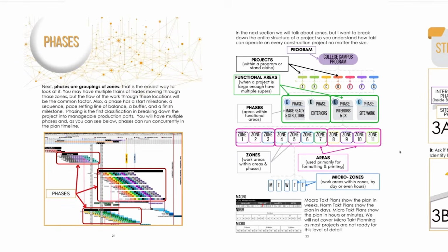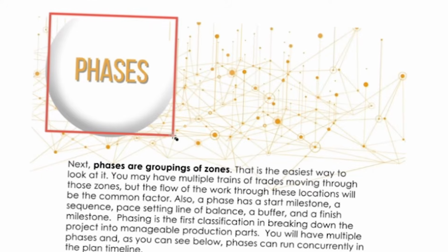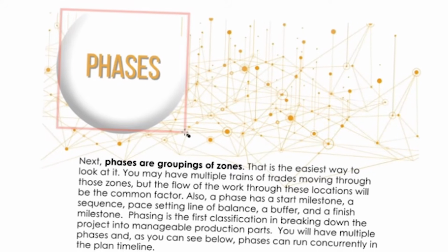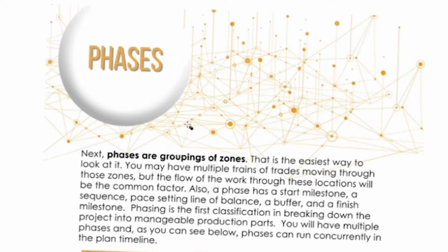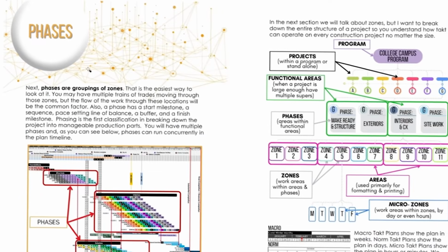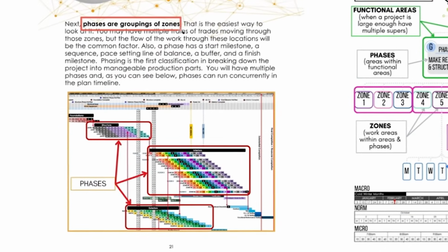Once you know your milestones, now it's time to identify your phases. So phases are interesting, and I need you to really pay attention here. So professor, if anybody's on their phone or texting or falling asleep, now's the time to wake them up. Okay? Phases have unique zones, and those zones are unique to the phase. Okay? It's not so much timeline, it's scope and path of work. So phases are groupings of zones.